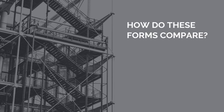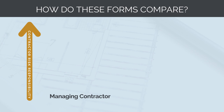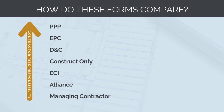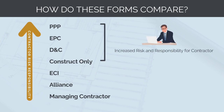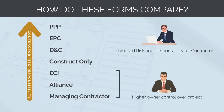As we went through all the different contract types, you may have noticed a consistent theme. We started with project delivery methods that had the lowest risk and responsibility transferred to the contractor, moving to the ones with the highest. Compare a managing contractor model, where the contractor takes no risk, to an EPC model, where the contractor is responsible for everything up to the end performance of the asset. In the opposite direction, the amount of control the owner has over the project changes — for a managing contractor model, the owner has much more flexibility to make changes as opposed to an EPC. Each of these models has a specific use and application; an alliance model may be perfect for one project but useless on another.